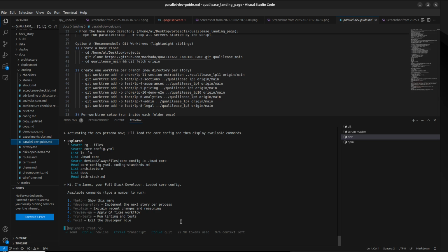And when I refresh the browser and try to check to see if that story was accomplished, it was very difficult to keep track and remember what I was even trying to accomplish. So I found it much better and faster to have one story being developed at a time, get that done, push it to git, move to the next story, as opposed to trying to tackle 5 stories at once.